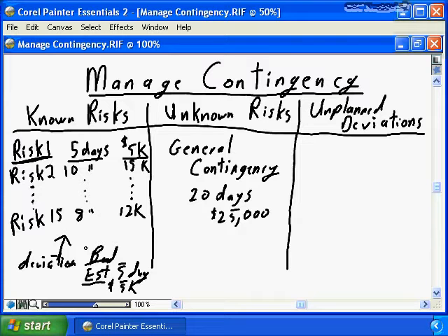That is a project occurrence that is really unrelated to risk, or maybe you had a risk event related to bad estimates, but in most instances you believe your estimates are as good and as realistic as possible, so that is simply a project delivery fact that needs to be dealt with, that you had bad estimates, that is totally unrelated to risk.